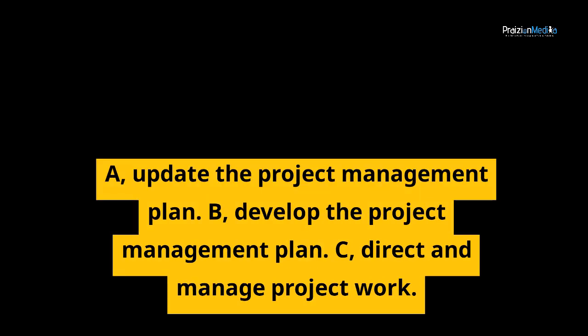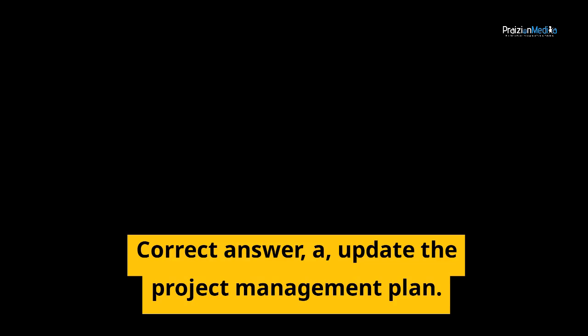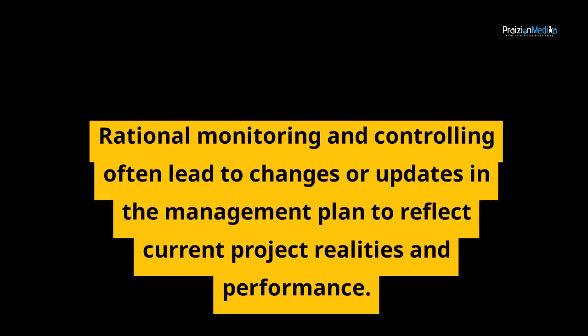A. Update the project management plan. B. Develop the project management plan. C. Direct and manage project work. Correct answer, A. Update the project management plan. Rationale. Monitoring and controlling often lead to changes or updates in the project management plan to reflect current project realities